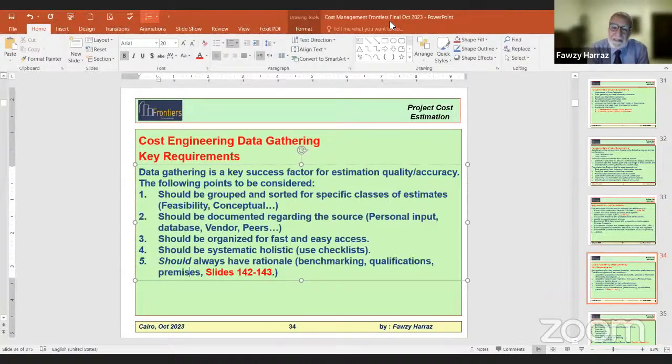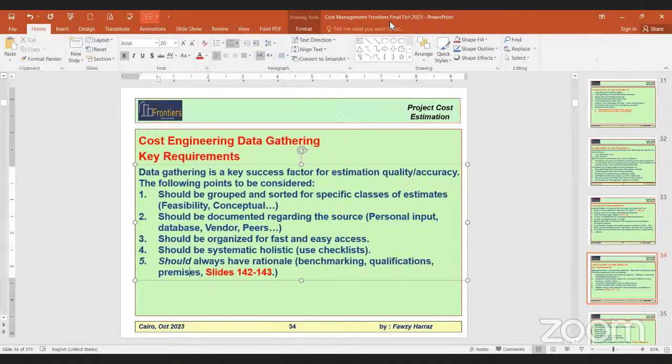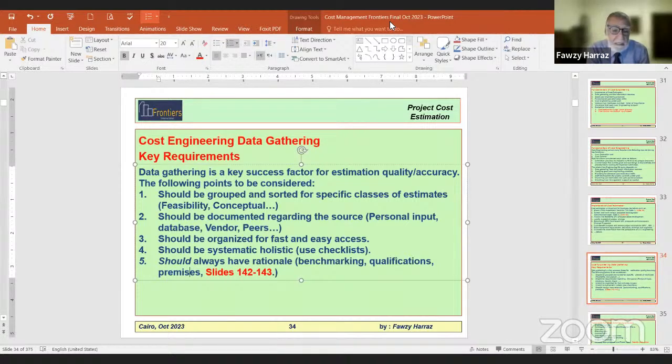This is one thing. All the scenarios are difficult. As I said, the two scenarios are worse than each other. But in any case, from the beginning, you should exclude this toxic low price. If the problem is a substantially high price, you need to cross-check the economics and pass it to the financial analyst people in the company and tell them, okay, give us your internal rate of return estimates and the NPV, and if it is still feasible, then God willing, we will have to accept it. And that's actually more assurance.